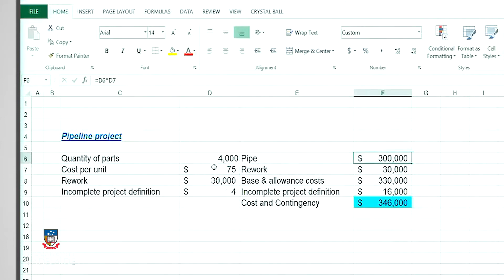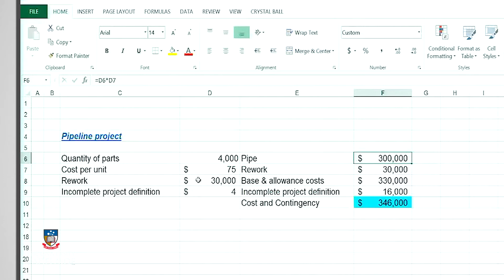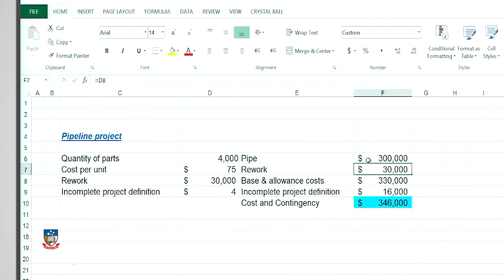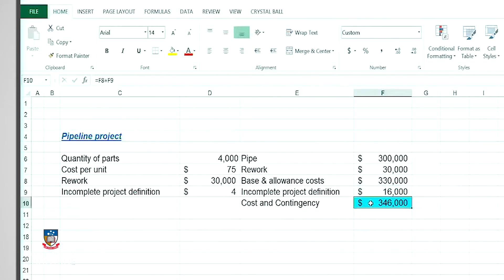I also know from my project scope that I always undertake some rework, just to ensure the quality of the pipe network is established. I know for sure that I undertake the rework, but what I am unsure about is if this is the exact amount. Hence, I will need to add an allowance for rework, which I estimate to be $30,000 or 10% of the $300,000. Now I need to make an estimate for the risks or assessed level of uncertainty for my pipeline project. I am going to estimate this to be $4 per pipe, adding a contingency of $16,000 to the cost estimate. So all up, my materials plus allowance plus contingency equals $346,000.